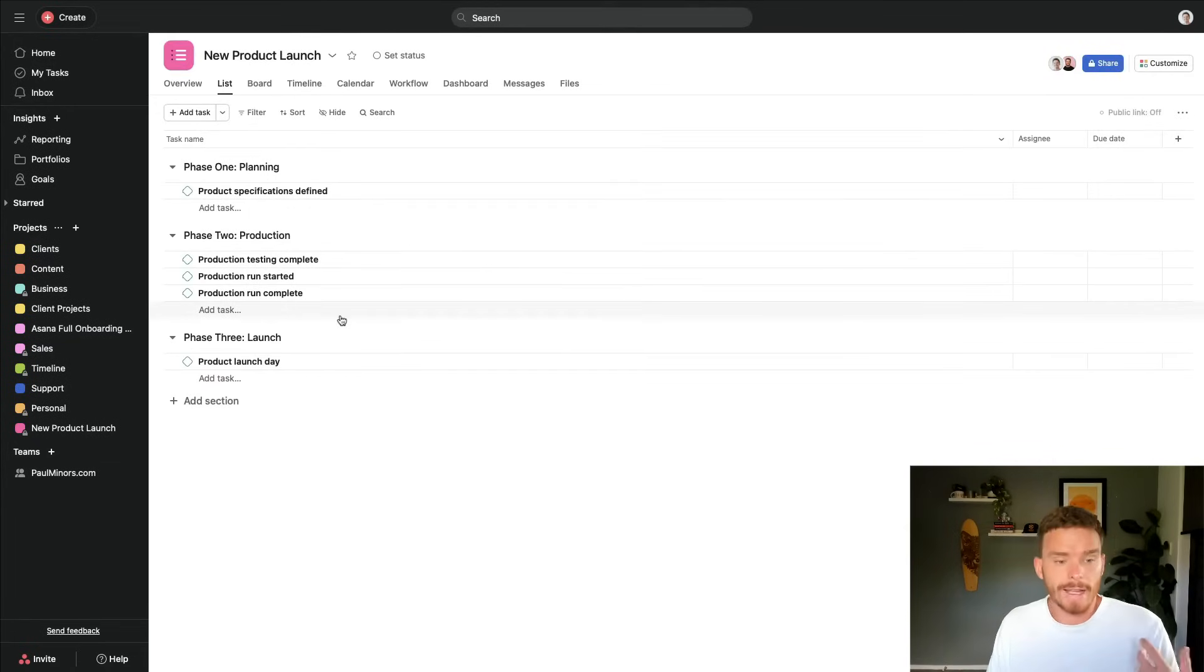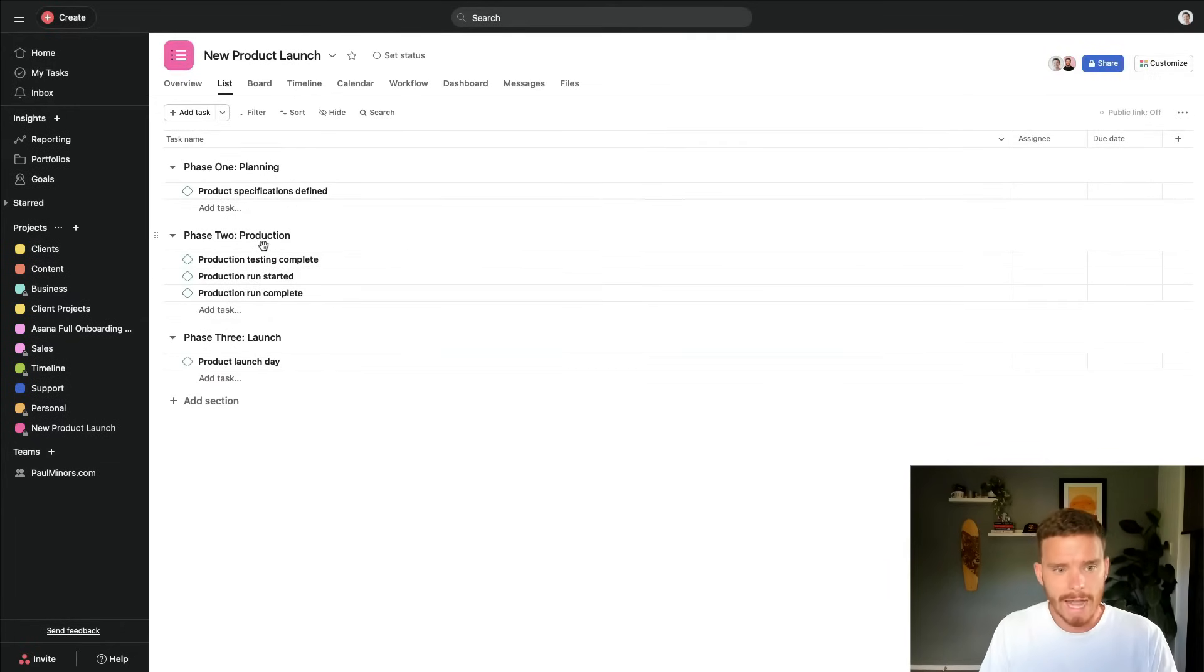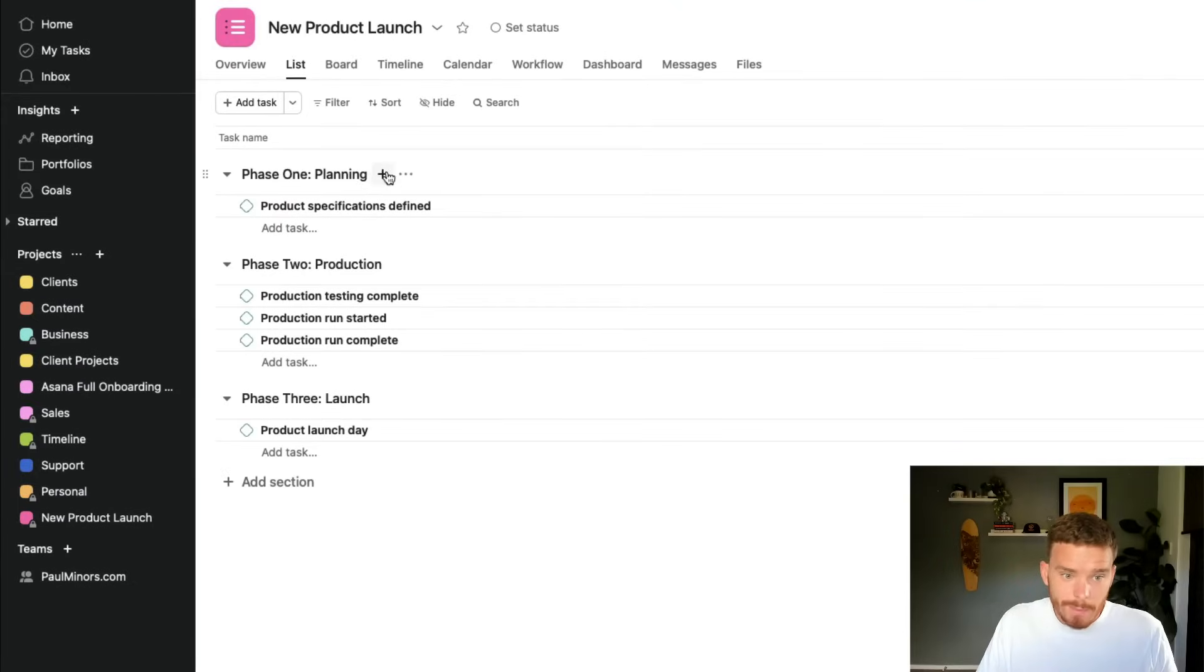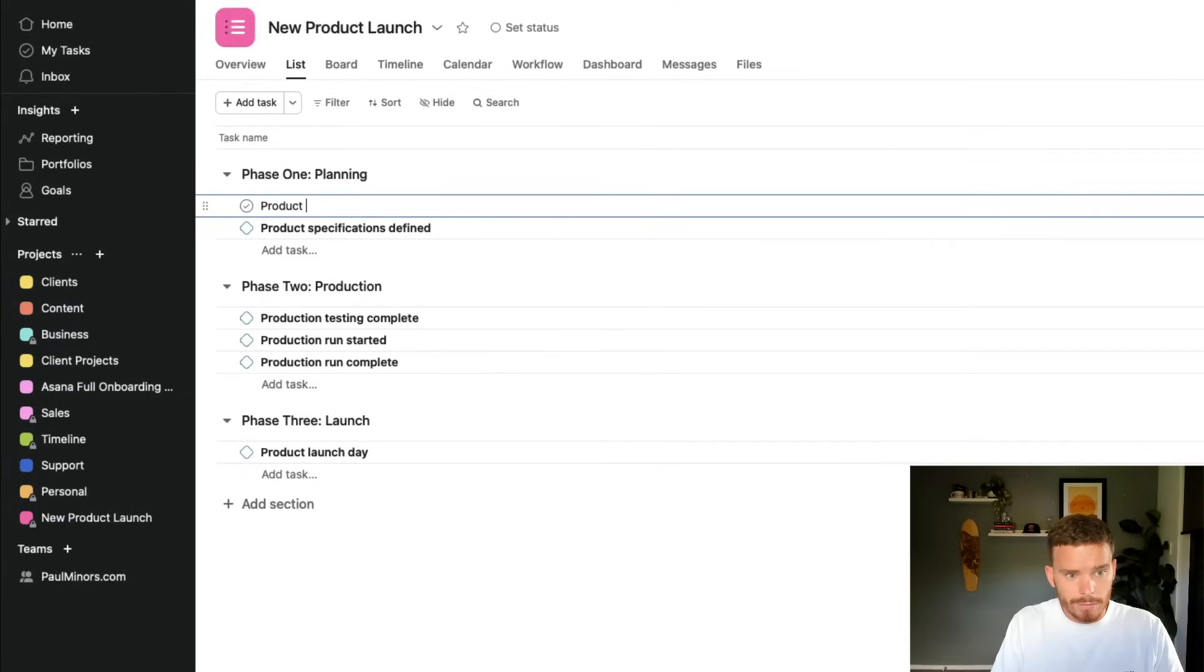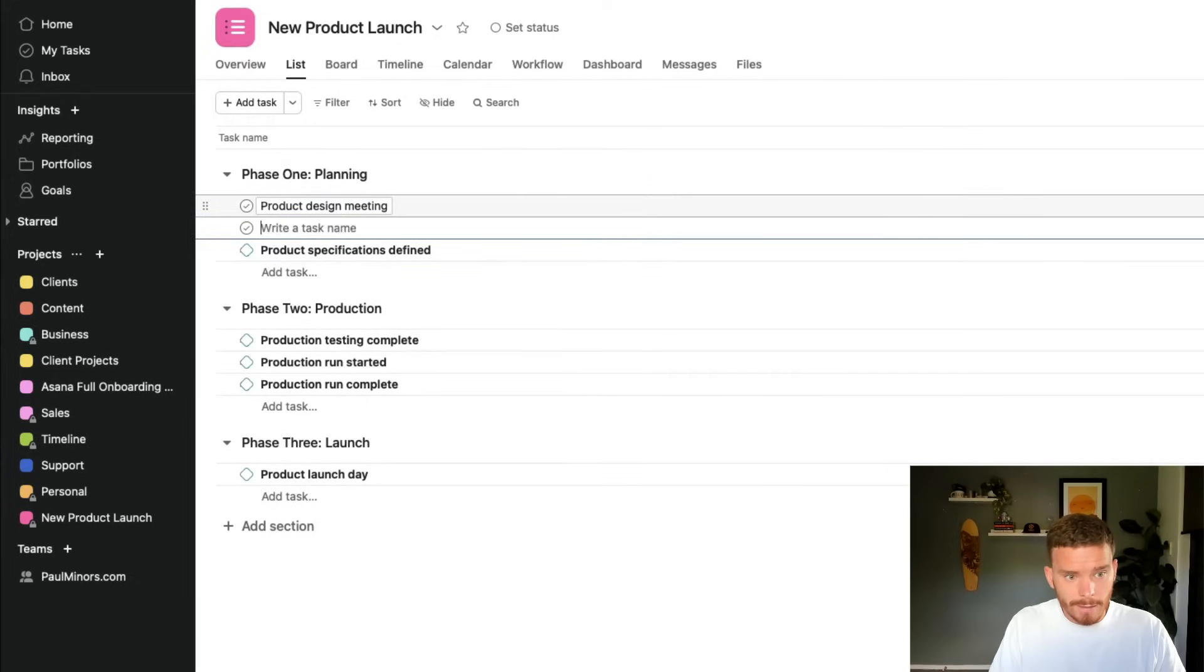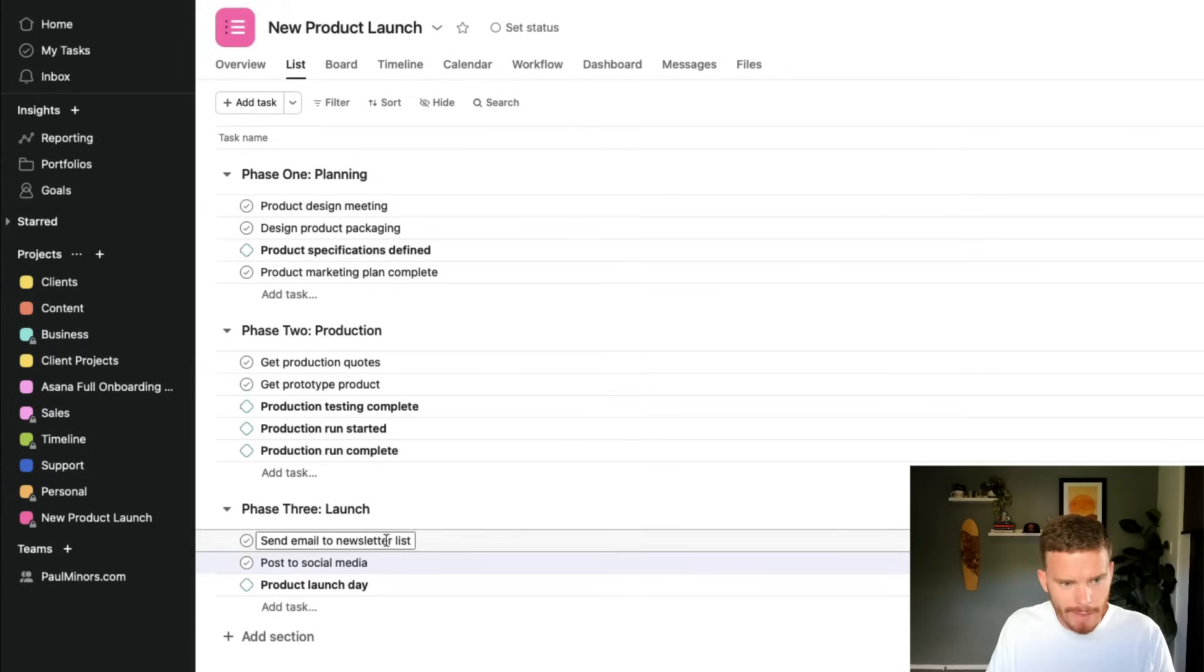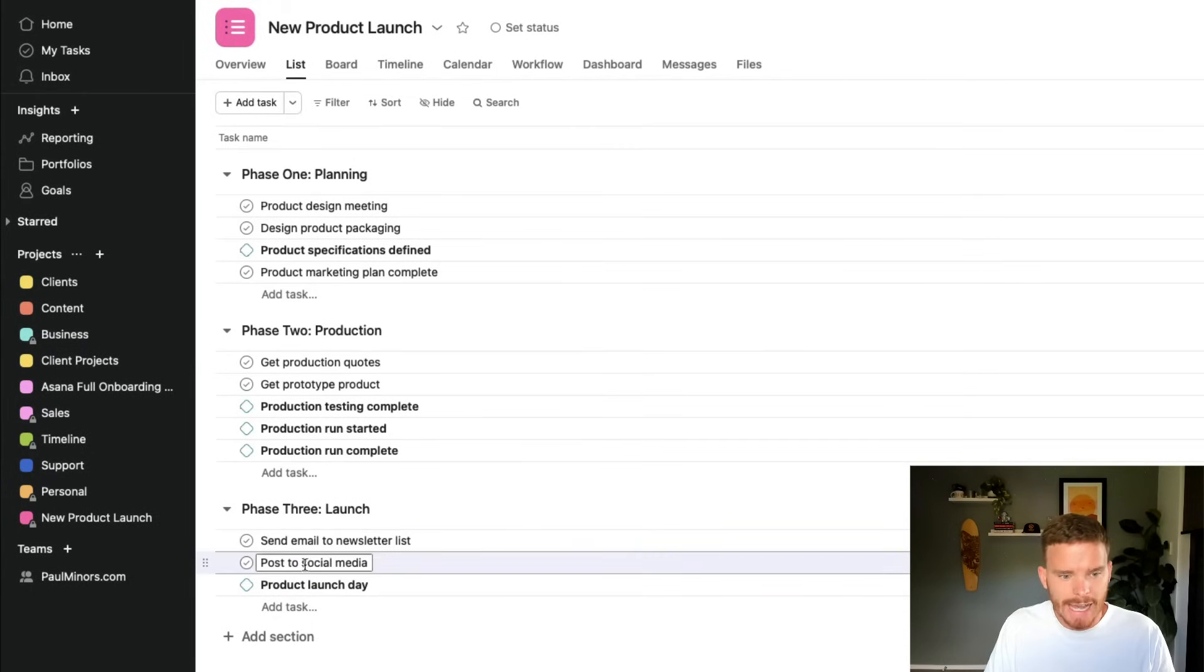Now I can actually go through the process of creating tasks for the smaller steps that we need to do to actually complete these various phases and stages of work. So in this planning section, I might have tasks for product design meeting. That might be a task design product packaging. Maybe I'll do another one here for product marketing plan complete. I've added a couple more down here in the launch phase for sending an email to our newsletter and posting on social media.